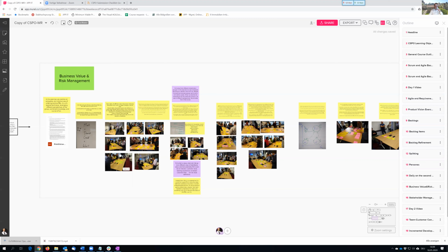The second round then is I'll give poker chips to the participants, and we reshuffle the items. We write on the back the letters M, S, or C. We reshuffle them, and then they need to give their poker chips to the product backlog items. So it's similar to dot voting, but the poker chips stand for business value or customer value.